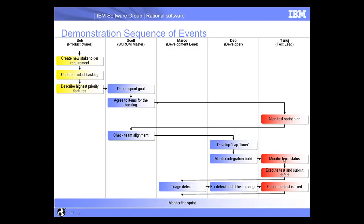Tanuj will be notified of that build and go ahead and start to execute test cases and submit defects via Quality Manager. Once the defect is found, Marco goes ahead and triages that defect, assigns it to Deb to be fixed, and then Tanuj reruns his test case to determine that the defect was indeed fixed.